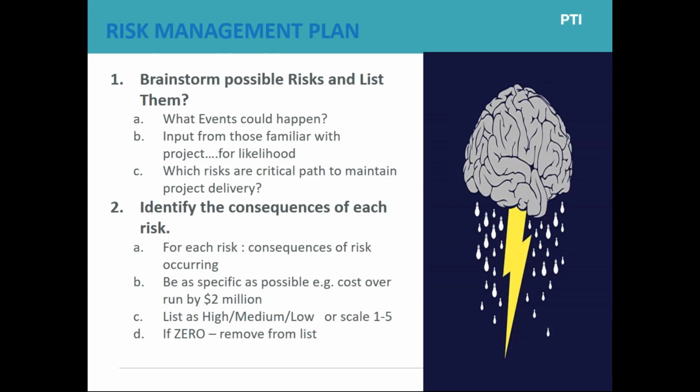Management plan, start off and brainstorm risks and list them. And some will be real risks, some you'll say these aren't risks at all for this particular time that we are outsourcing this project. But brainstorm them as a sponsor and then jointly with your service provider so that you can get the benefits of their knowledge. Having identified the risks, look at them and analyze them.